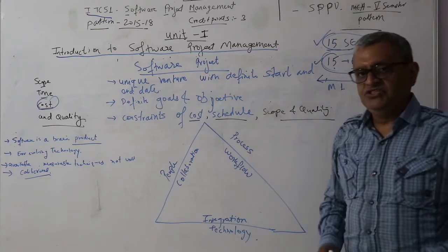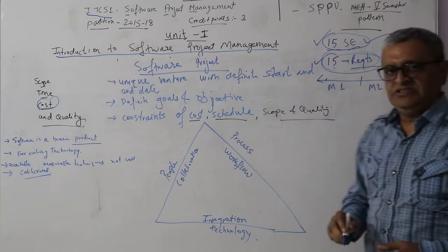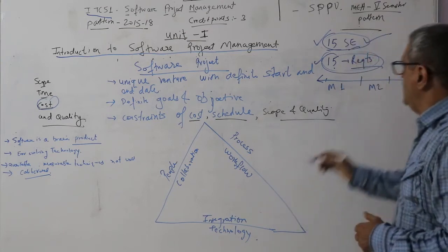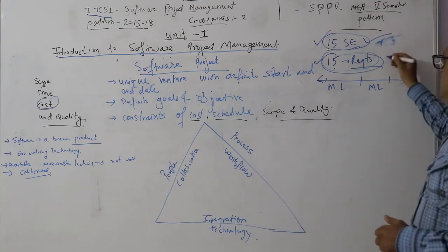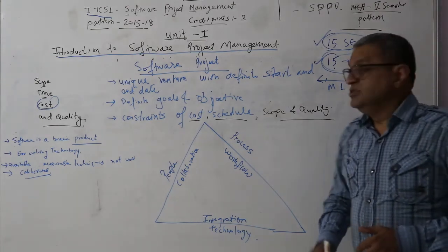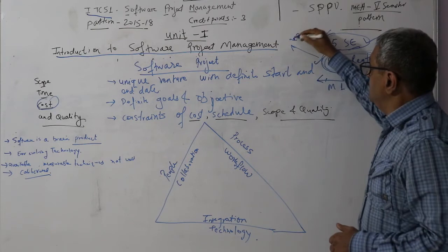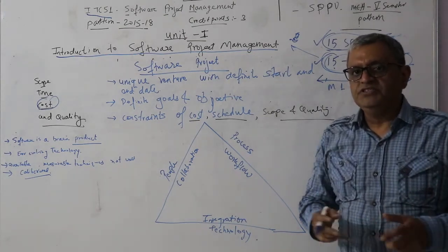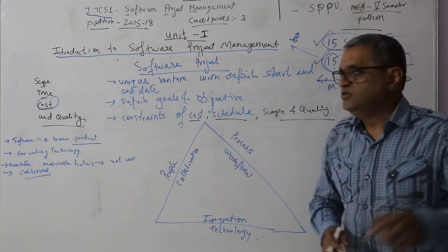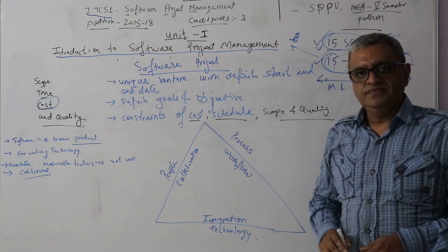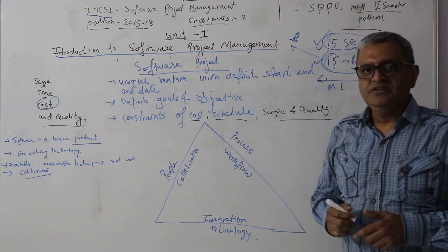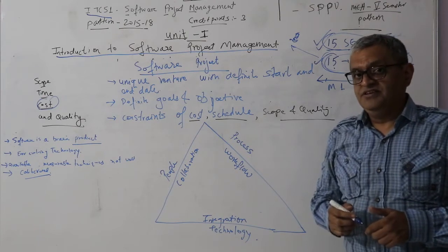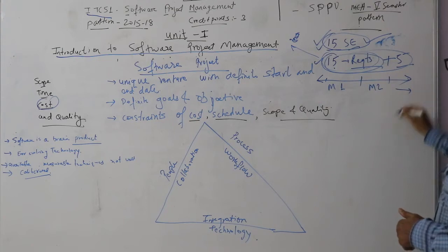Now the customer comes and says they want to add 5 more requirements, so the scope changes to 20 requirements. But the customer says they have no additional budget, so those 20 requirements must be done with the same 15 engineers. As a project manager, I think about it and go back to the customer and say: fine, I can do that, provided you give me an additional month.